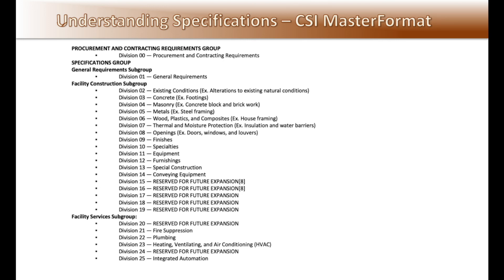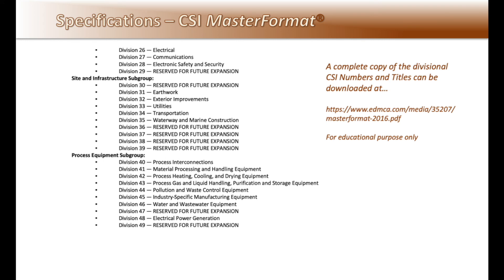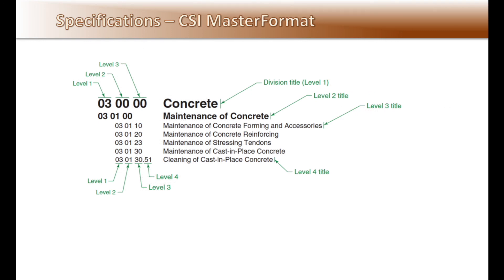See pages 364 and 365 in the book. Some divisions are reserved for future expansion. This numbering system makes finding information related to project areas of work and materials much more consistent. A complete copy of the divisional CSI numbering and titles can be downloaded at the noted website. The Master Format uses a six-digit system. The first two numbers designate the main divisional area — like 03 for concrete — which is Level 1. Levels 2 and 3 are further breakdowns of the related basic topic, and Level 4 is used to further break down a specific topic when needed.